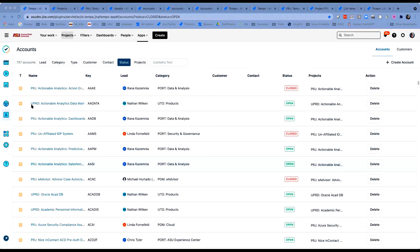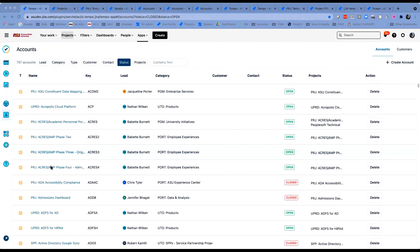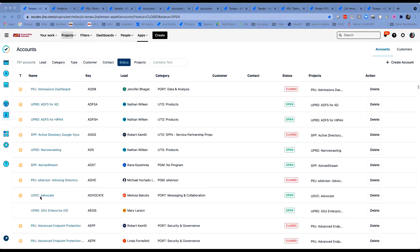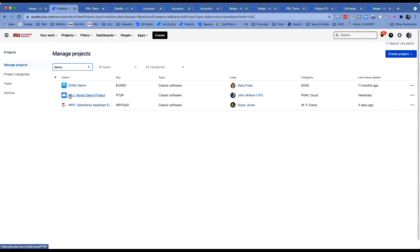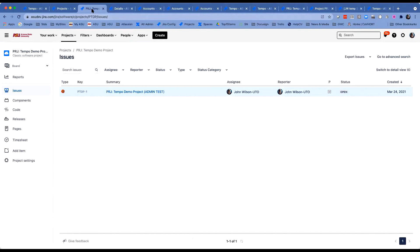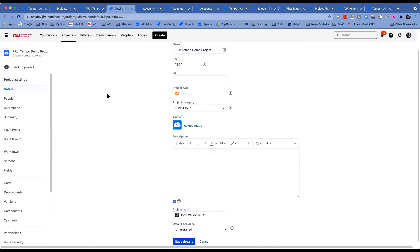I'm sharing a Chrome page with Tempo accounts. What we're going to look at right now is how we create and integrate our Tempo accounts into our projects. We use the accounts to aggregate time logs and plans for reporting. This is an example of our naming scheme: all official projects start with PRJ, products start with UPRD, and services have their own prefix like USBC. Each project gets its own single account so we can collect all the Tempo data we need from any project's work.